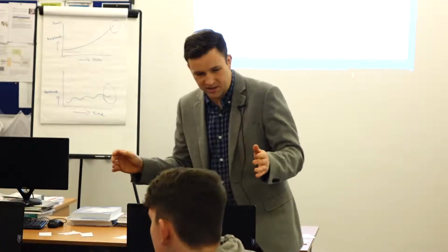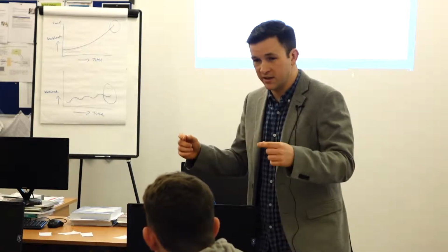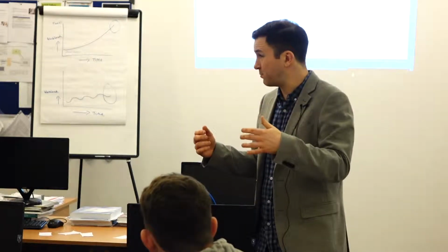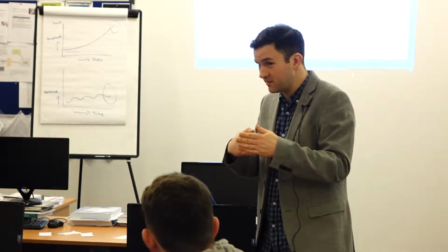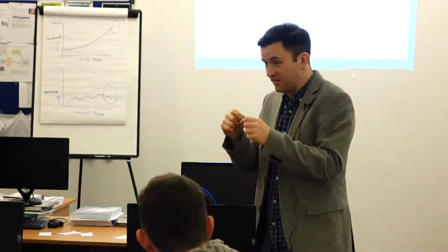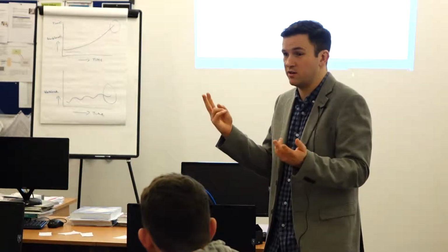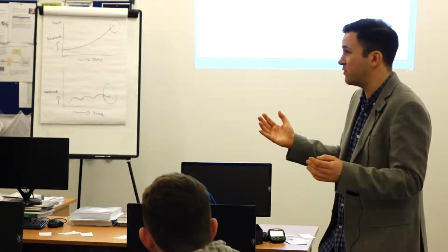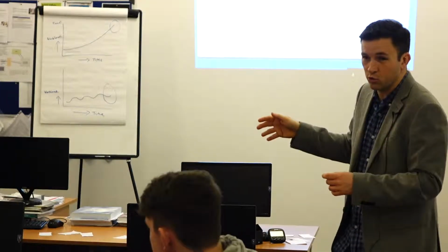Because we're populating from different websites, all the bits and bobs, all the components of how it's going to look. Basically, 2 minutes in sprint planning, I'll time it on this. All I want you to do is pick up to 6 points, pick up to 8 points, and then take the features that you pick that are up to those values, and then break them down into the separate screens you need for those bits. If it's one screen, that's fine. If it's 2, that's fine. You probably won't find it's much over that, but just decide which screens you're going to need, because in the next 5 minutes, you're then going to draw those screens.